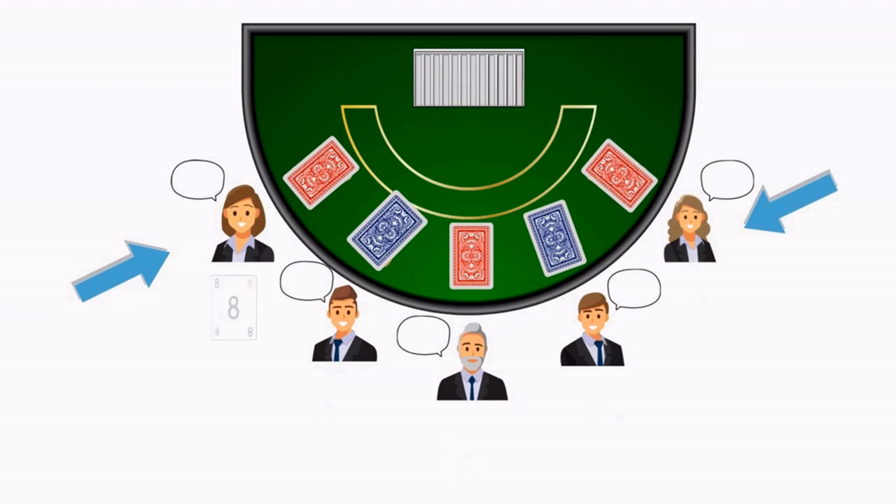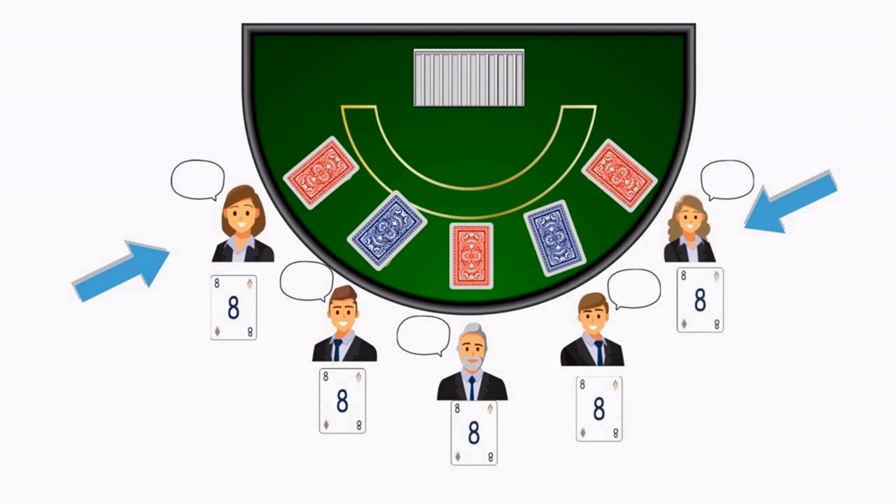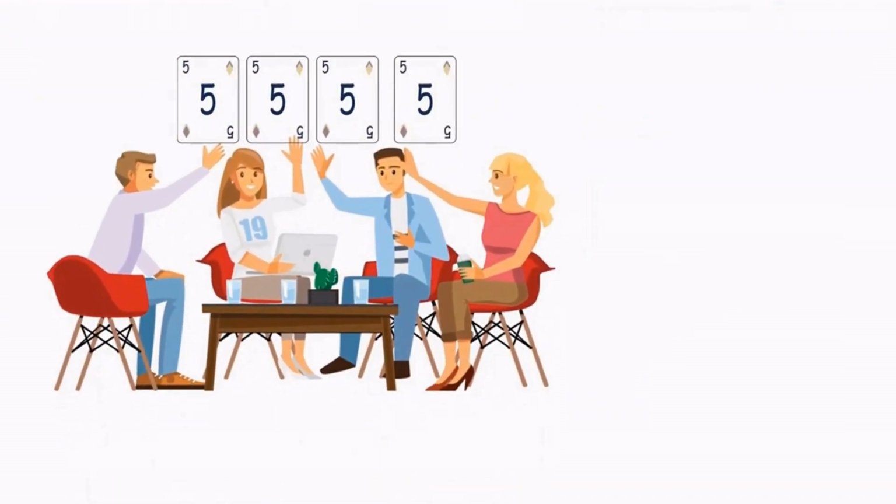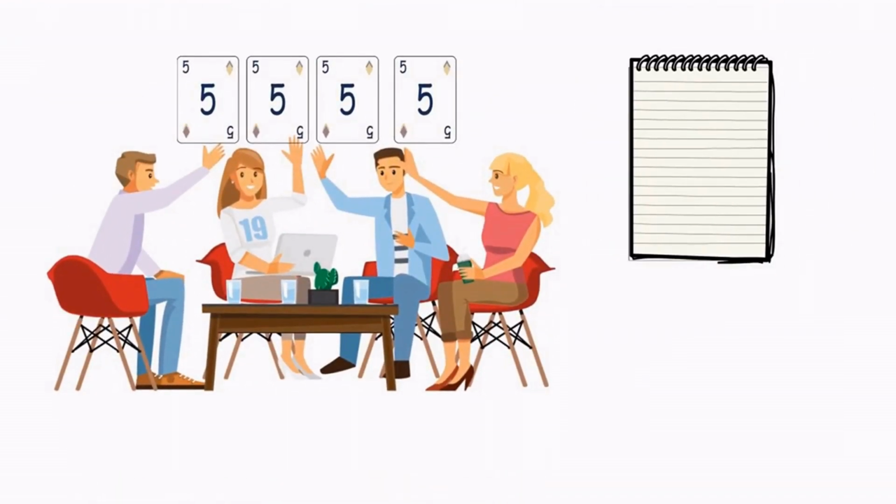Then there is a discussion. If the scores differ, it is clarified why the developer or tester gave such a score. After their explanations, a revote is made. If after that, the results do not jump very much, then the story borders are selected. If the results jump anyway, then the arithmetic mean is taken. Thus, planning poker usually evaluates the complexity of tasks.